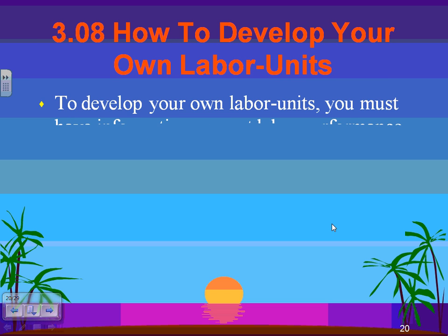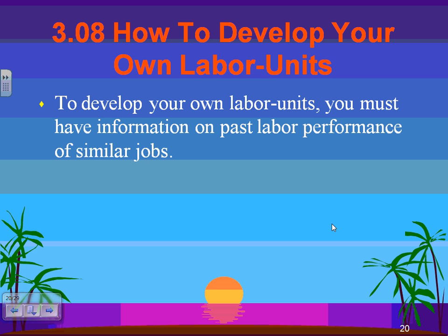How to develop your labor unit? The ultimate solution for Elliott Contractors is to have their own labor unit based on skilled, motivated electricians, assuming you hire the electricians and manage them most of the time, and they're your full-time employees, guys. Now, most of the electricians you don't hire. For our shops, they work from the hall for your company. So the key point is information about the past labor performance of similar jobs. The best labor unit that you can use is your own.